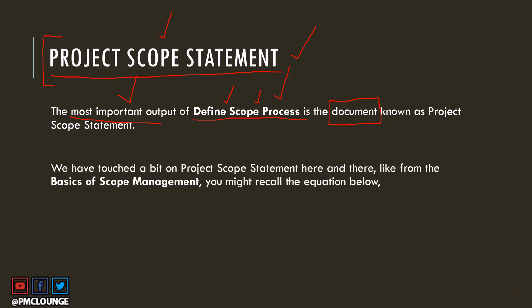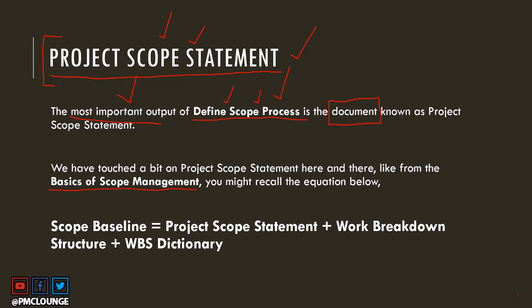We've touched on this topic here and there in several videos and articles. The fourth link in the description is the basics of scope management video, where we covered an equation: scope baseline equals project scope statement plus work breakdown structure plus WBS dictionary. So when you say you have baselined scope, it means you have three documents — the project scope statement, the WBS, and the WBS dictionary — that make up your scope baseline.